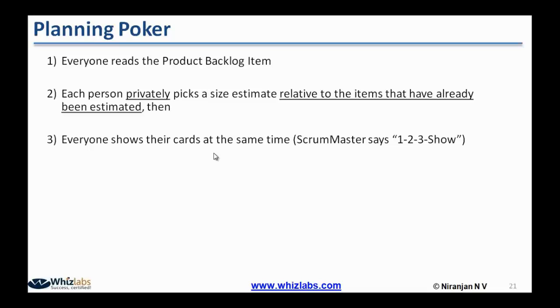So the Scrum Master will take these 2 people, the highest estimator and the lowest estimator, and normally starts with the highest estimator. Now he will ask the fourth team member, can you please tell me why you think 40 story points is the number you have given? Then the fourth team member will start explaining this to the other team members.